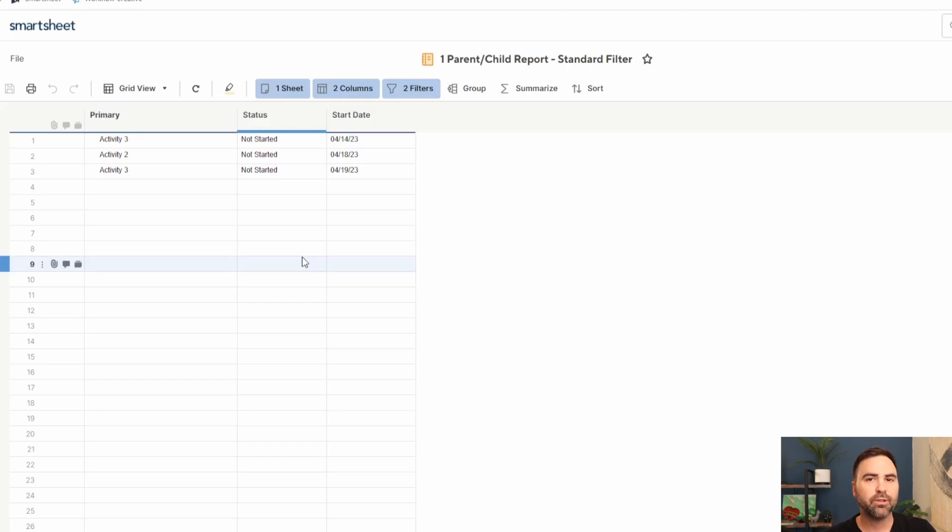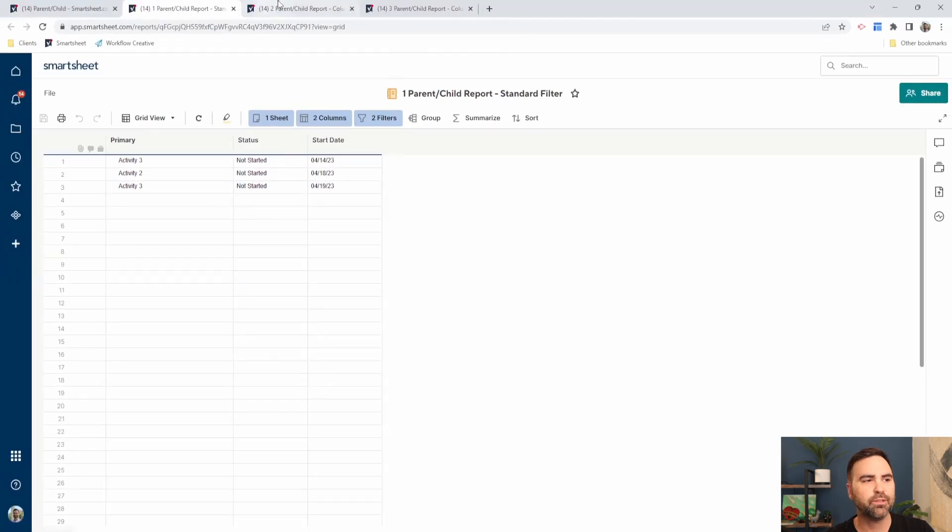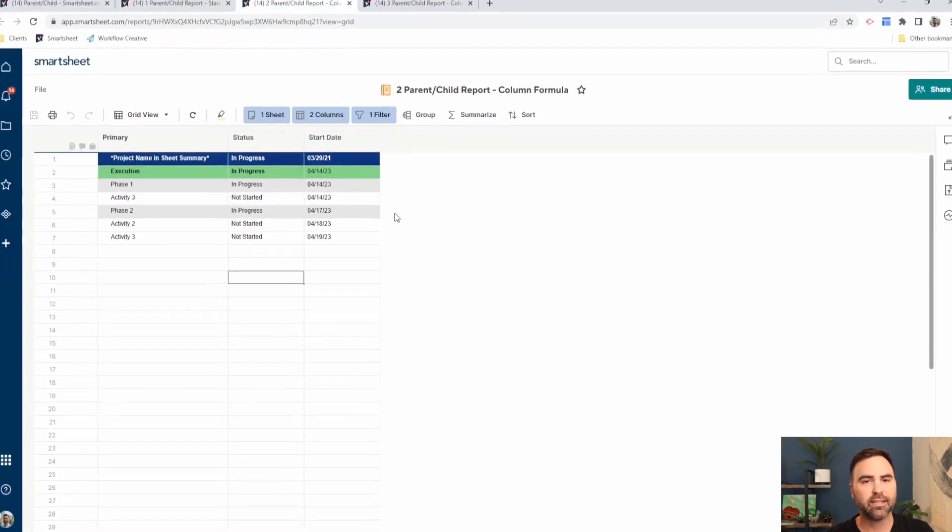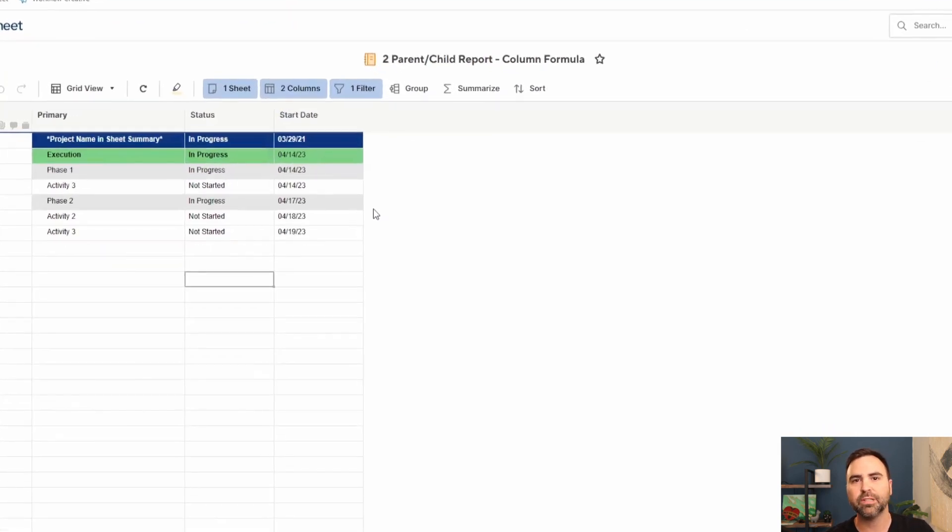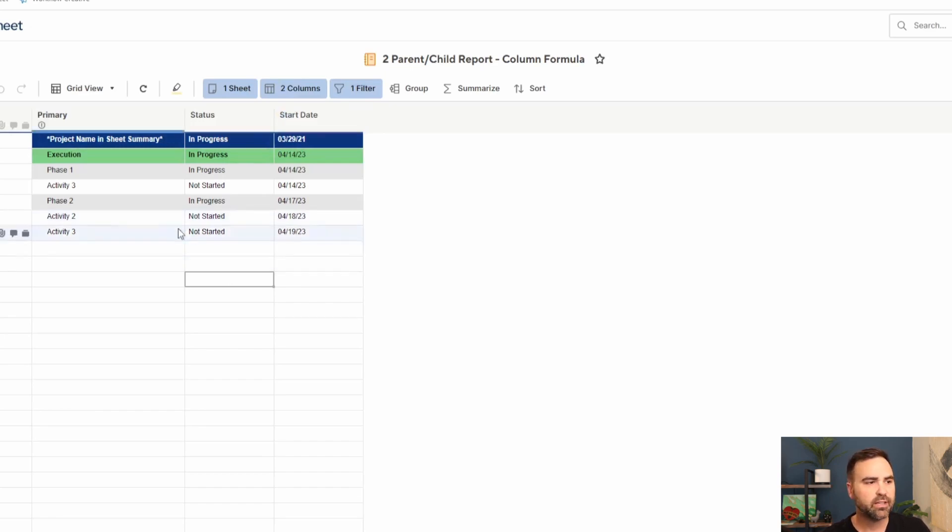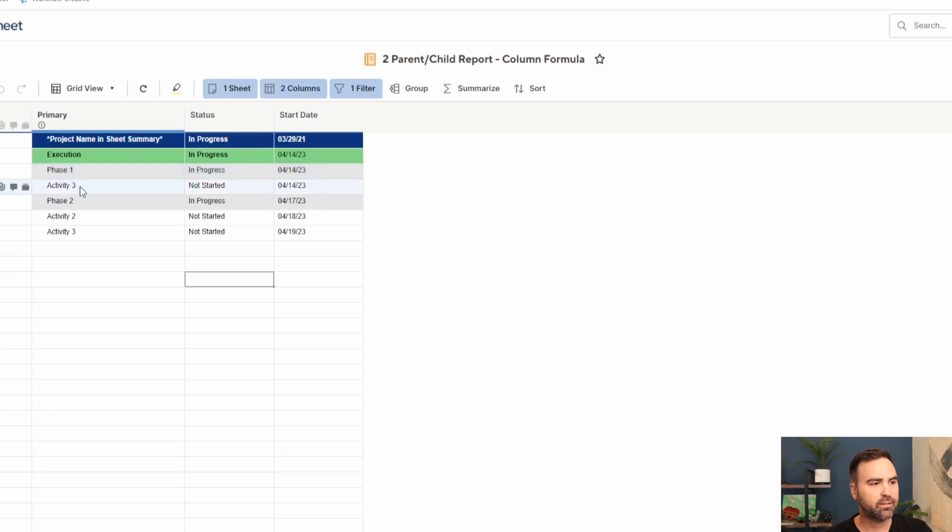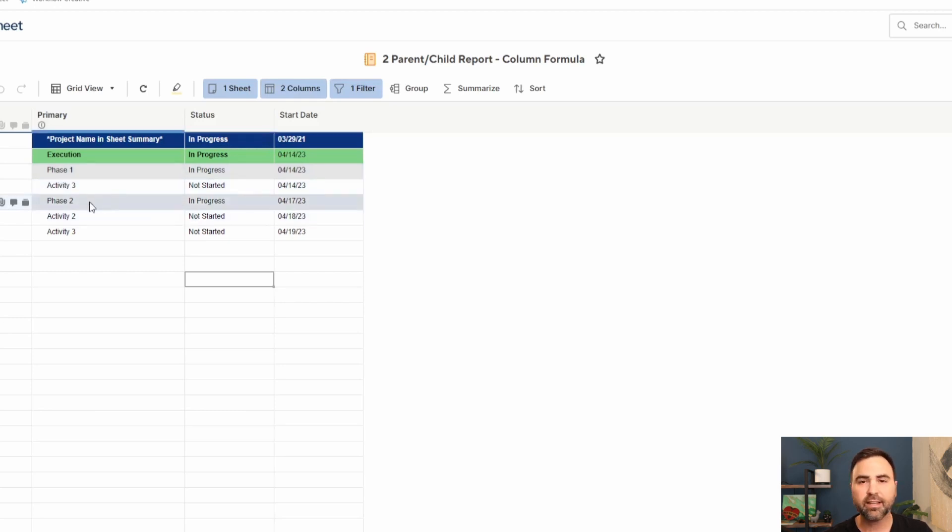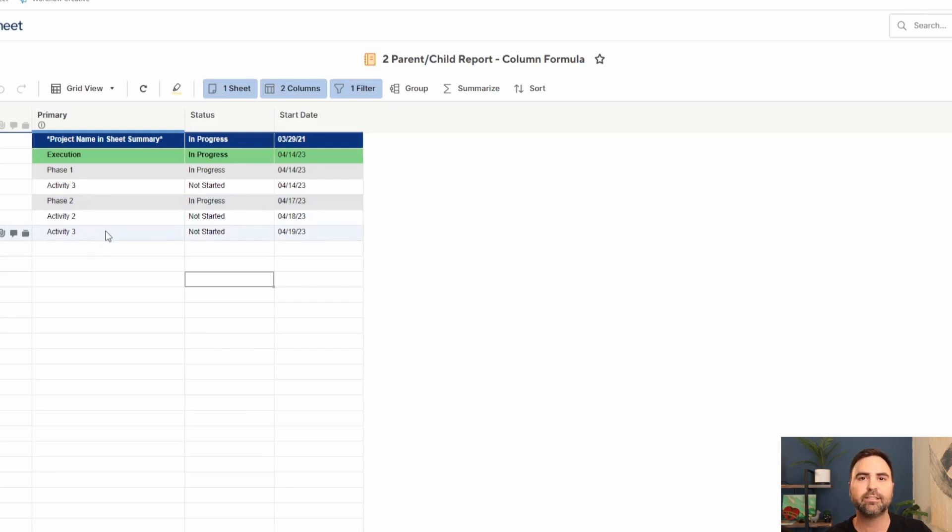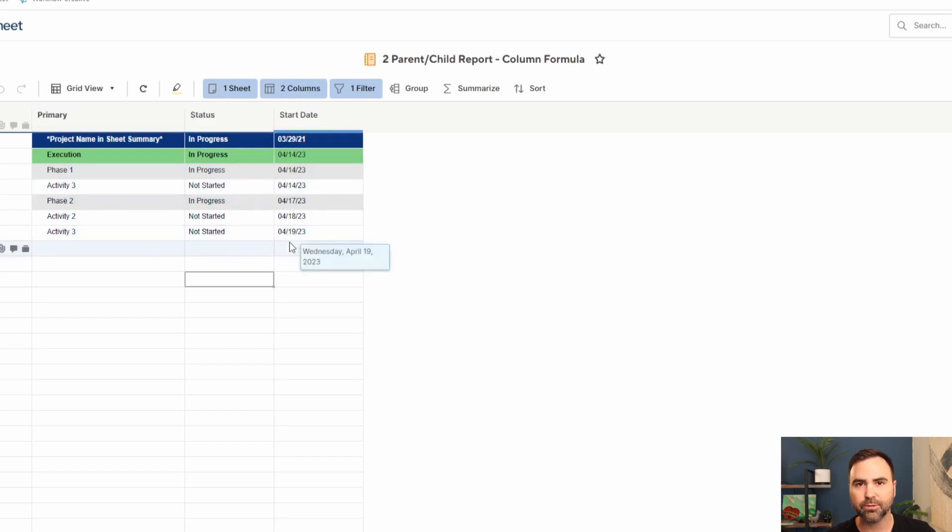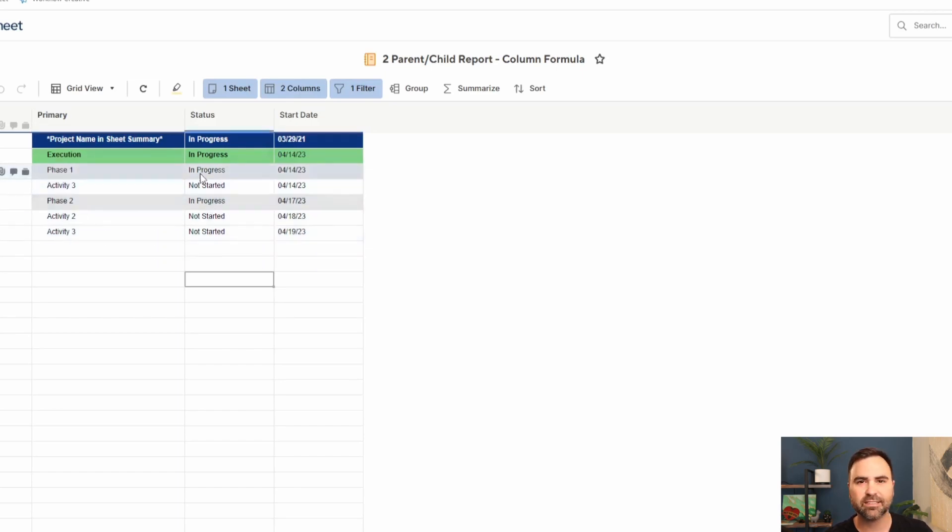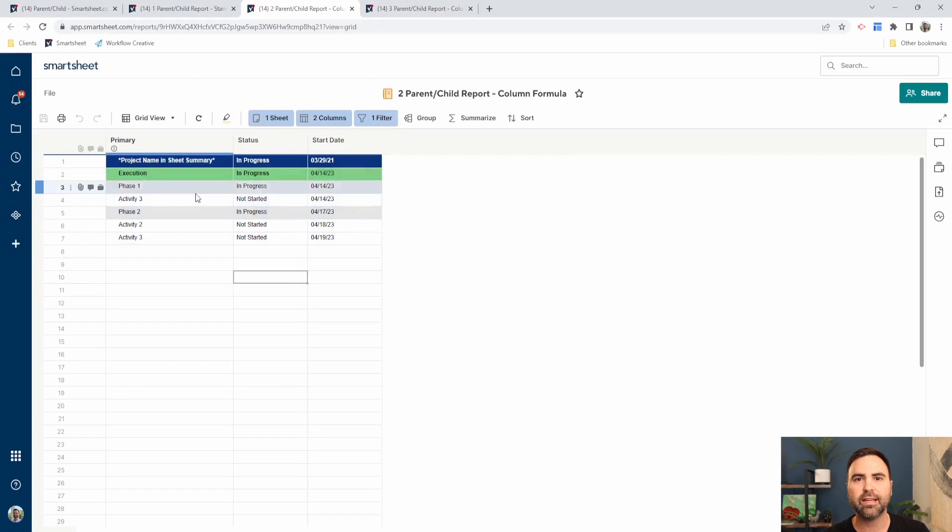I'm going to show you a report that I built that has a column formula in the sheet that elevates a little bit more data to our report. Now at least we have the project name, this section of the project here, the phase that we're in, the task that we're in that's behind schedule, the second phase that we're in with those two tasks that are behind schedule. Now at least we can see that our two activity threes that have not started and are behind schedule because the start dates in the past, we can see contextually where they live in our project plan.